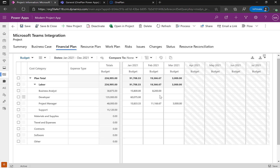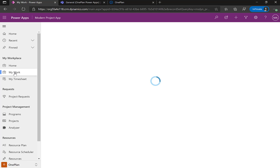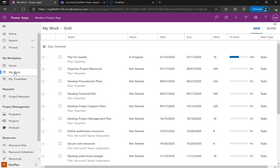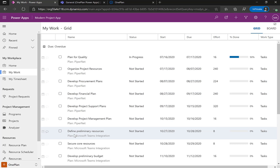Publishing your Microsoft Project file into OnePlan and Power Apps gives you the ability to build out your resource plan and financial plan. Team members can also log in, see what work is assigned to them, when it's due, and provide status back. For example, here's a task to define preliminary resources for the Microsoft Teams Integration project that was due back in October — I'll go ahead and mark that particular task as complete.